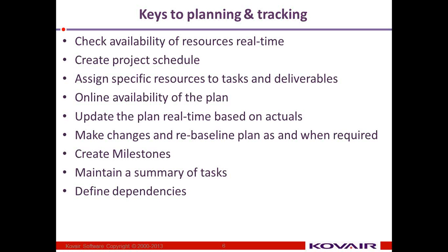Then create milestones. This is another thing, because in the case of big projects, the number of tasks or activities to be tracked is huge. Now when that list becomes big, it is very difficult to maintain and track them task by task. So it is much better if we create milestones, which is basically nothing but grouping of certain tasks, and track those milestones against the parameters of time, cost, scope and quality.